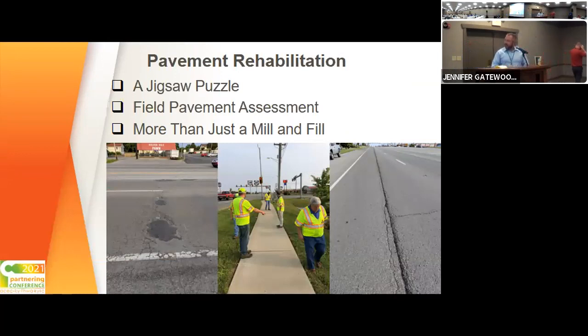So David mentioned the pavement rehab project earlier. That came together in the 2018 highway plan, and it really let us do a whole lot more with the corridor than we originally planned. We originally had those 7 individual intersections for our cuts. The pavement rehab really let us turn it into a full 3 miles through the most heavily congested portion of the corridor, close up those medians, add a lot of median U-turns.